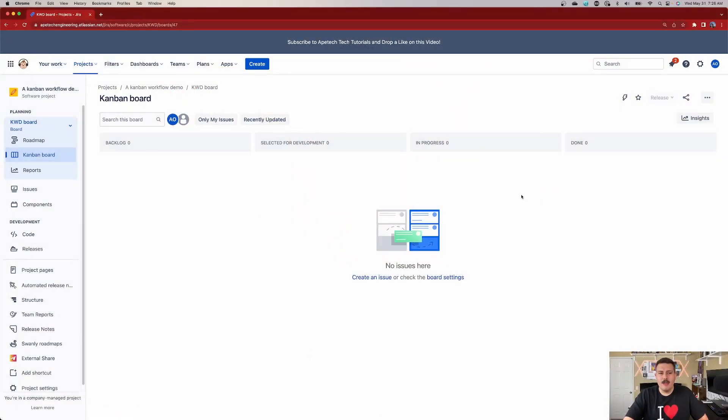Another difference is that your backlog, rather than being in a dedicated section, is actually on your board itself. This means that whenever you create an issue — unlike a Scrum project where it goes into a hidden backlog and nothing shows up until you hit Start Sprint — the moment you create an issue in Kanban, it shows up on your board. This can be good or bad. Also, unlike Scrum which only shows stories, tasks, and bugs, this board shows you everything, including epics and all issue types, which can become very overwhelming.